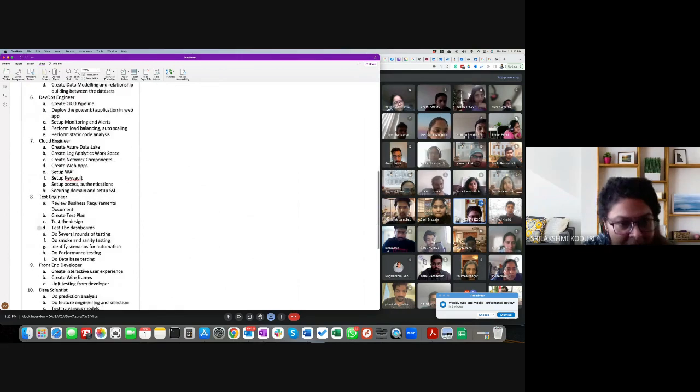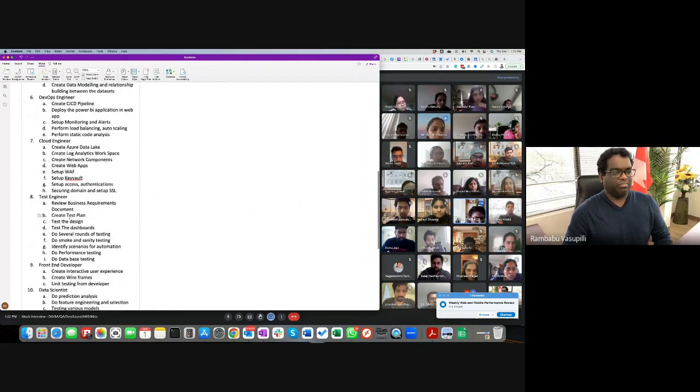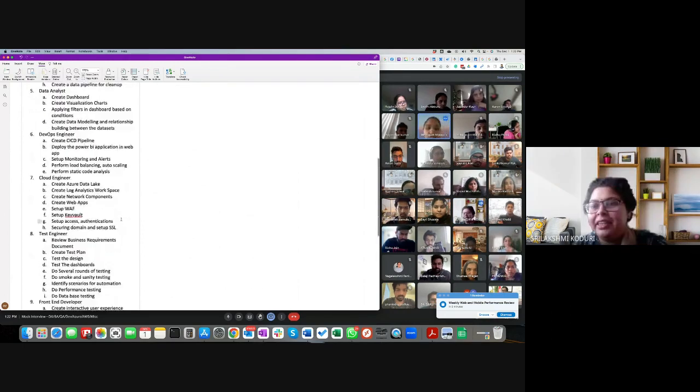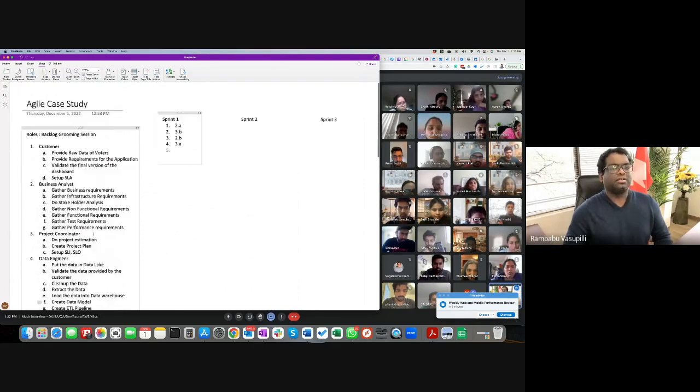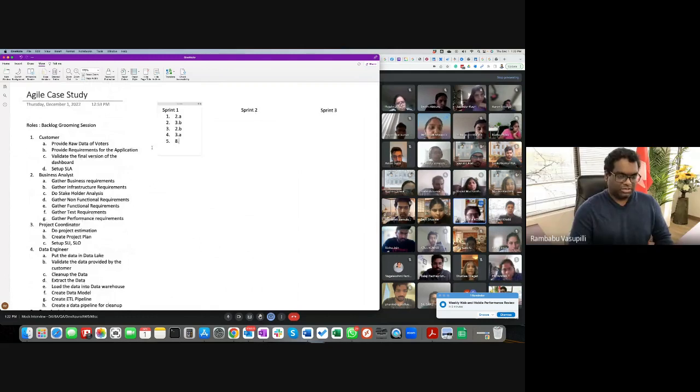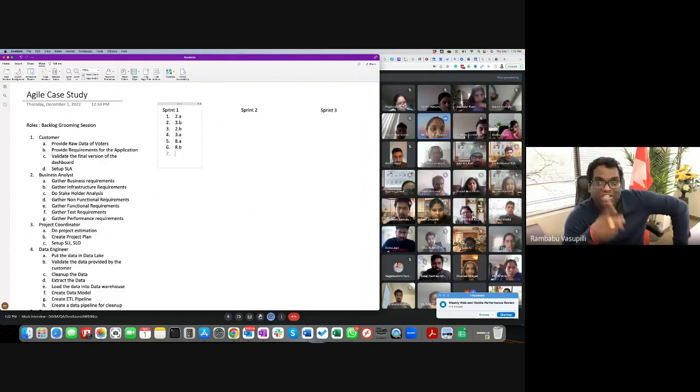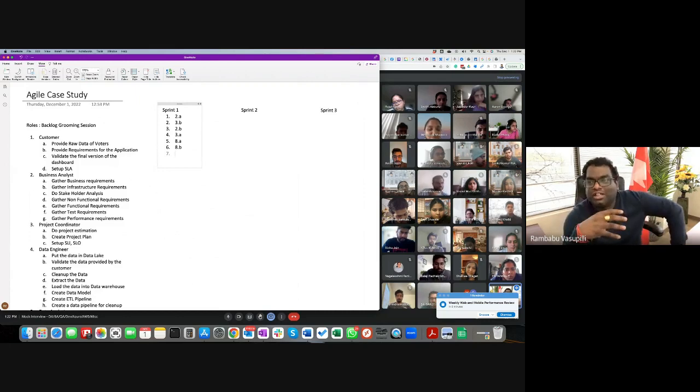No, sir, I can't see the number. So 8A. 8A and 8B. Yeah, 8A and 8B. Next, 9A. Remember, in every sprint, every role should have a ticket. We cannot keep the DevOps engineer idle in sprint 1. That is the beauty of the sprint.